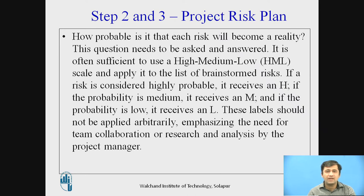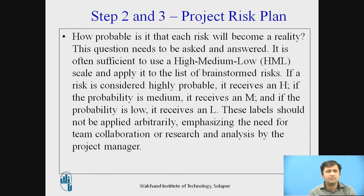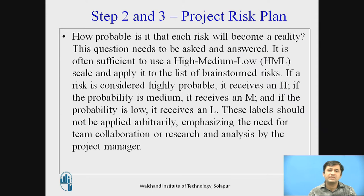In this step, at an initial level, we have to summarize that list by impact. If the risk is considered highly probable, it receives an H. If the probability is medium, it receives M. If the probability is low, it receives L. I am talking about probability of occurrence of that risk — whether it is high, medium, or low. This generally comes with experience, some forecasting, or discussion among the team. These labels should not be applied arbitrarily, emphasizing the need for team collaboration or research analysis by the project manager.